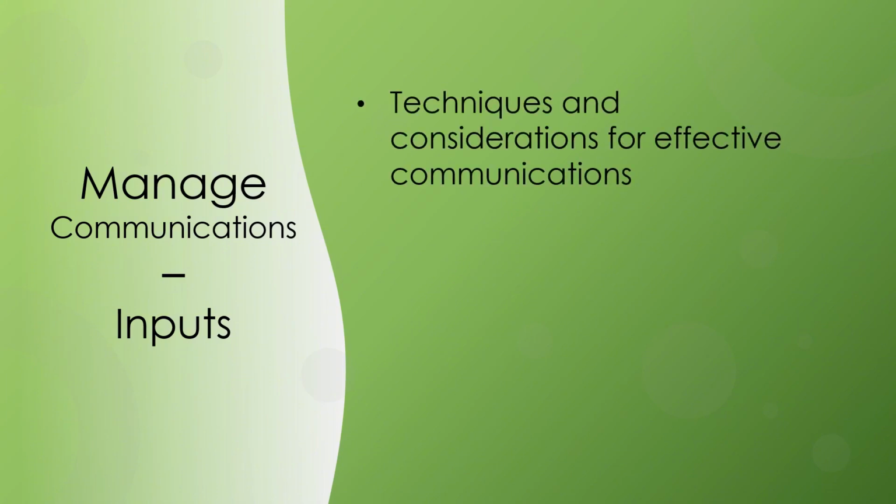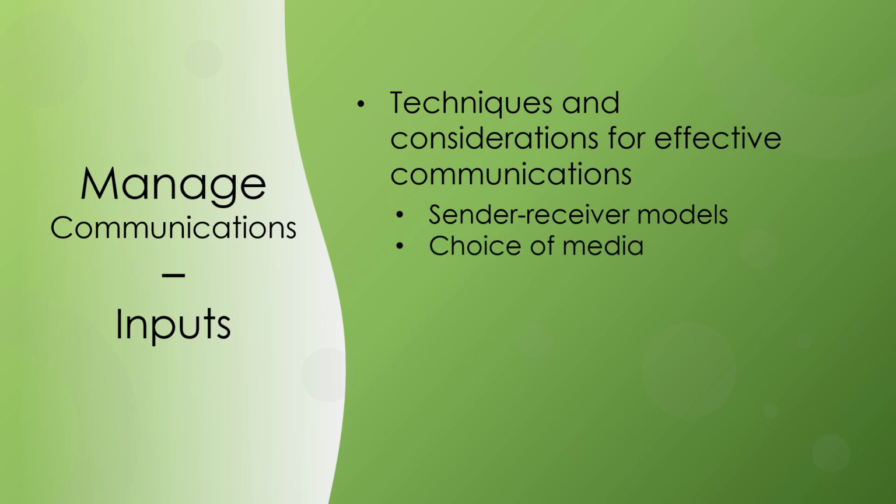Techniques and considerations for effective communications management include sender-receiver models. This model incorporates feedback loops to provide opportunities for interaction or participation and remove barriers to effective communication. Choice of media: decisions about application of communications artifacts to meet specific project needs, such as when to communicate in writing versus orally, when to prepare an informal memo versus a formal report, and when to use push-pull options, and the choice of appropriate technology.